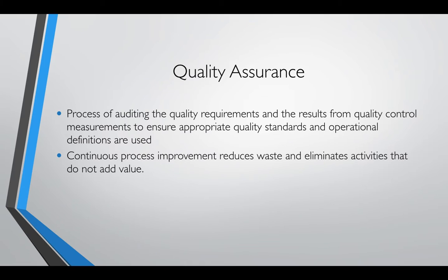That's A. B, is the checklist being processed correctly? So are we marking off the yes, no boxes correctly? Are we getting the signatures as the checklist tells us to get? Let's say we want the field engineer and the inspector to sign off both on the checklist, or we want the third party inspection agency to sign off on the checklist.